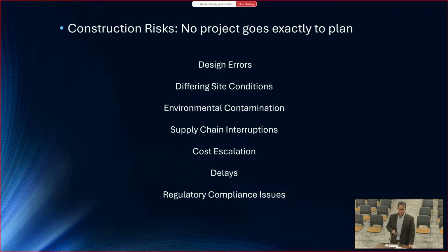Now, certainly some of those things might be somebody's fault, right? If there's a delay that is the result of the contractor not appropriately scheduling his subcontractors, or if one of his subcontractors leaves him high and dry, and that creates a problem in the critical path for completion of the contract, that's on the contractor, and usually there's going to be liquidated damages for that. But the weather delay is nobody's fault, right? The striking dock workers in Seattle that mean we can't get materials, that's not the city's fault, it's not the contractor's fault. Who bears that risk?